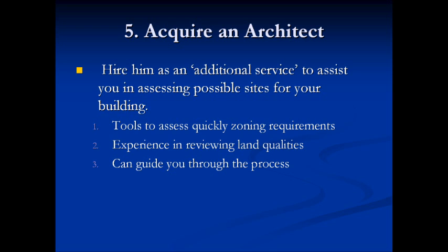Another thing to consider related to this is if you bought a property for commercial purposes and it's in a flood zone, you may be able to still salvage the possibility of doing your building there, but part of the problem is it's going to cost a lot more money by way of bringing a civil engineer in order to build the property up enough so that flood issues will not end up being actual issues.